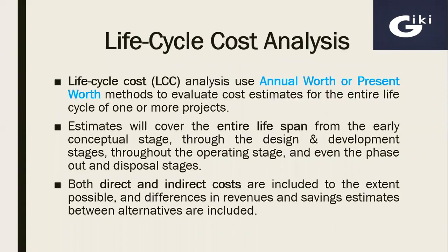Now, life cycle cost analysis. Life cycle cost analysis uses annual worth or present worth methods to evaluate cost estimates for the entire life cycle of one or more projects. This means you can evaluate one or more than one project by using life cycle cost analysis. Estimates will cover the entire lifespan from the early conceptual stage through the design and development stage, through the operating stage, and even the phase out and disposal stages. Both direct and indirect costs are included to the extent possible. Differences in revenues and savings estimates between alternatives are also included.